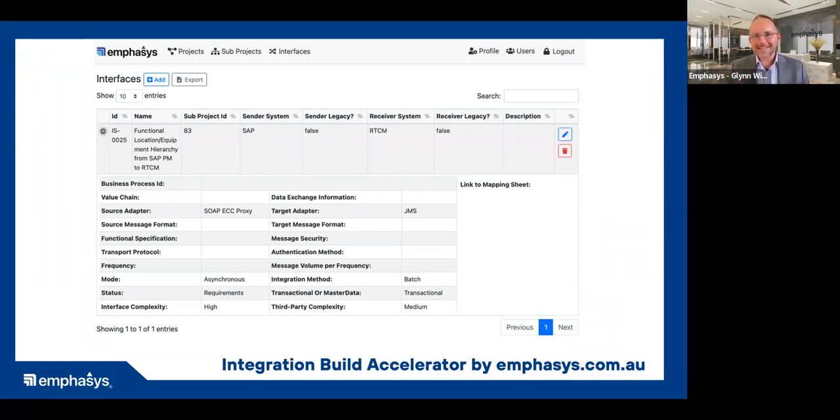And we fed all of this into Power BI, where we can map and we can manage the build of the integration across all the partners, and what stage the build is in, and what technology is being used. So we can even maximize the way that we develop things. For example, you don't wish to do all your hardest integrations first with your vendors, which are necessarily not going to assist you. So you might wish to do some medium risk integrations first, and then move on to some easier ones, followed by some hard ones. So there's a way and there's a footprint to manage these things.